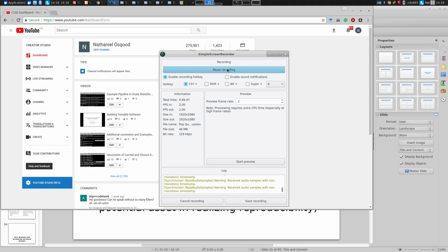So you're putting in place measures that will head off risk exposure, lessen risk exposure. One way to do that is you make it unlikely the risk will come about. The second way, if it comes about, it'll be less severe in its implications. And that's mitigation, putting that into place up front at the inception, heading off our risk exposure.